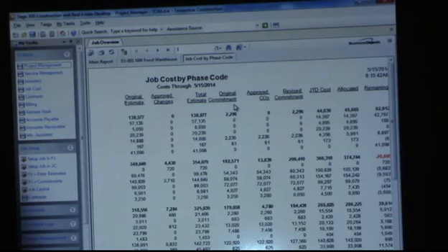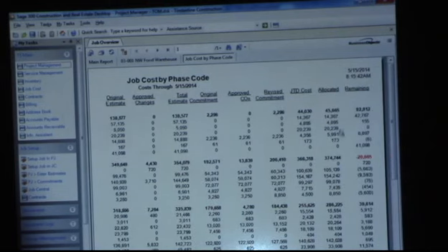But as a project manager, the fact that the job to date cost is zero, you still don't get to spend all $10,000. You only have $2,000 left to spend because you've spent the first eight by issuing that subcontract. So the commitment will document those purchase orders and subcontracts, so that you can track, so job to date costs is an accounting term.